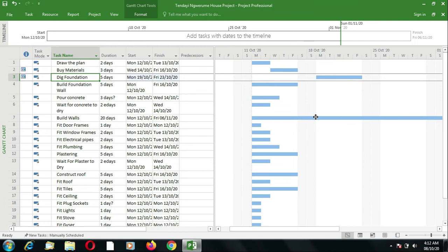Now you can see that I told it to start on the 17th, and then it sees that 17th is a Saturday, and then there's also a Sunday. So it will not agree to start on the 17th, even though when I drag, I drop it into 17, but it's going to automatically go to the nearest or to the earliest working day, which is the Monday.